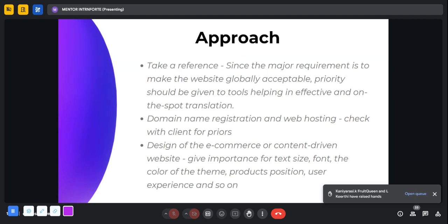If you start haphazardly with the code, there will be a lot of changes, leading to a lot of wasted time. So it's the work of the project manager or project coordinator to see that the entire roadmap is done, and only then does the coding start. If they have any questions in between, it is the responsibility of the project manager to clear them with the client.